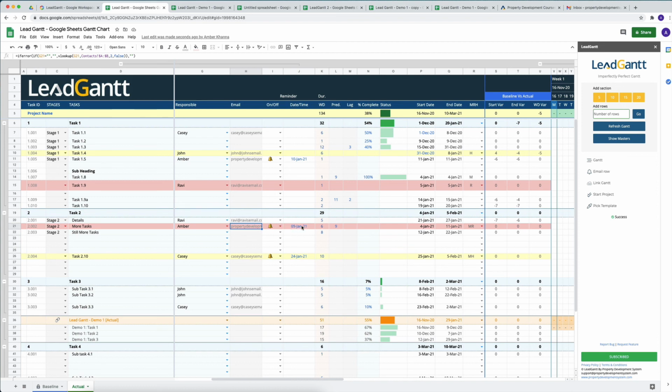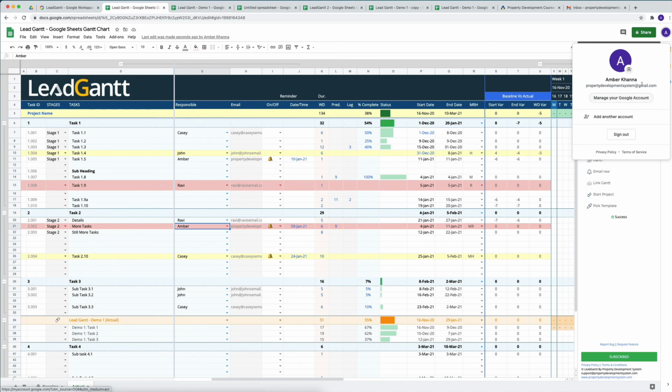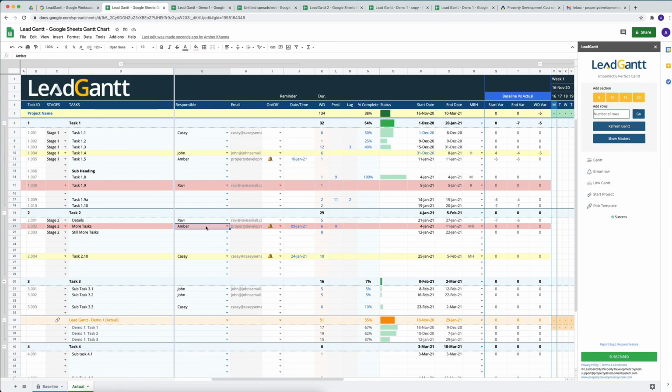So once this is set up, what you have to remember is one of the limitations. It is not a limitation in the way we've set it up, it's a limitation with Google Sheets, because it apparently has a bug. You have to make sure that you're only logged into one account. If you've got more than one Gmail account or a G Suite account, this will not fire, because when it is time for the trigger to kick in and send the reminder, it will not be able to determine which email address to use in order to send that reminder.